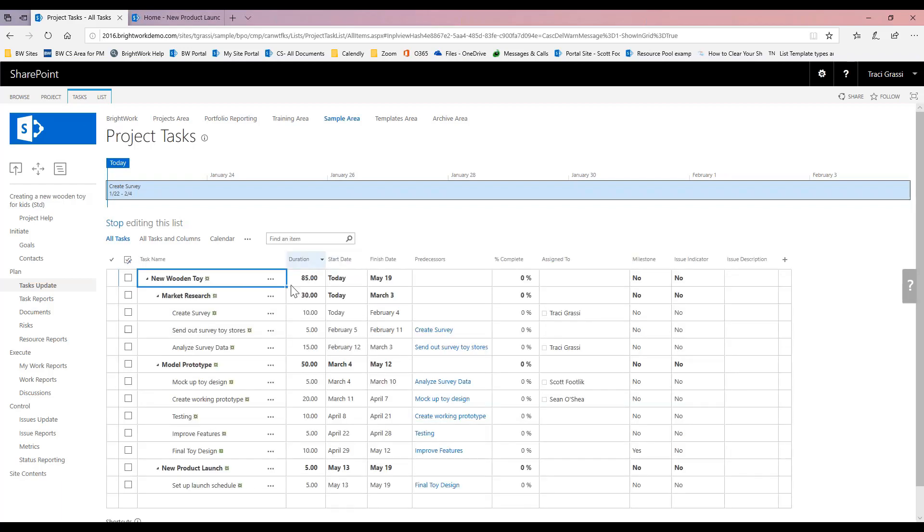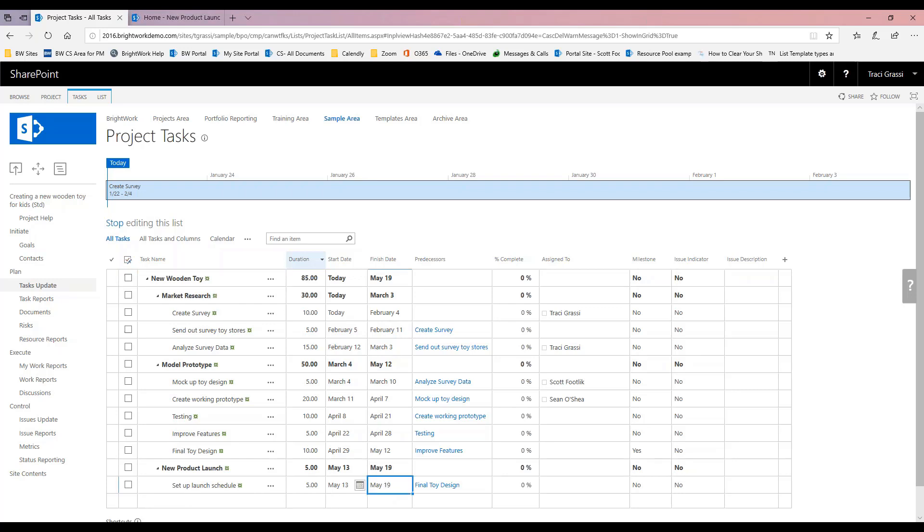So now you'll see that we went ahead and this task is actually going to start today. Since it's 10 days, it's going to go through February 4th and so on, and my project is actually going to be completed on May 19th. At my summary line, I see my project is 85 days and today through May 19th is my project.